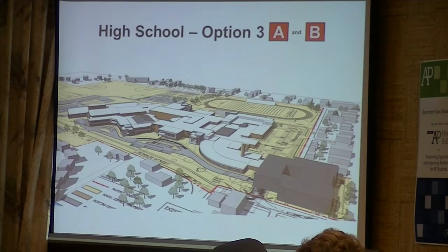We do need to use that building all the way through the construction project. I'm going to show another slide with the timeline, and until the spring of 2016, we're going to need that building as part of the construction process. So there is some time to make the decision on its use, because it needs to be used for classroom space and for swing space during the construction of the high school project. That's going to be very important to this process, to have that space available as we construct new space and have to move students in and out.